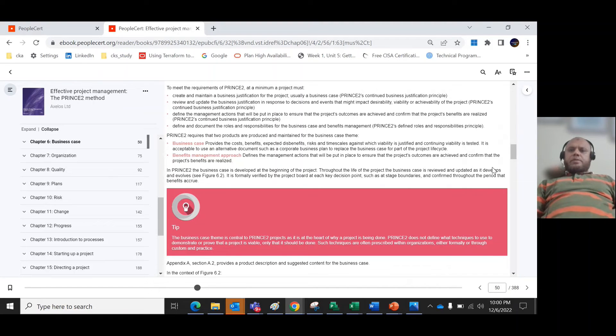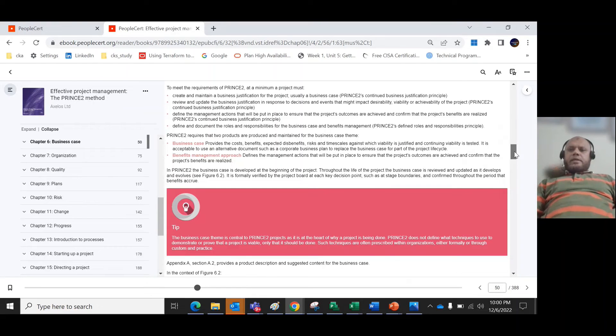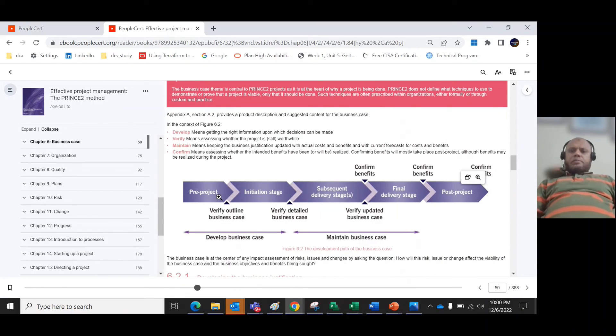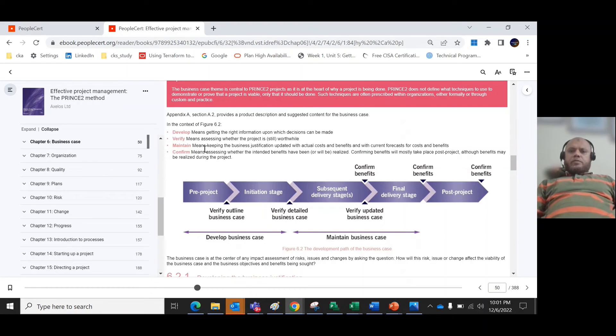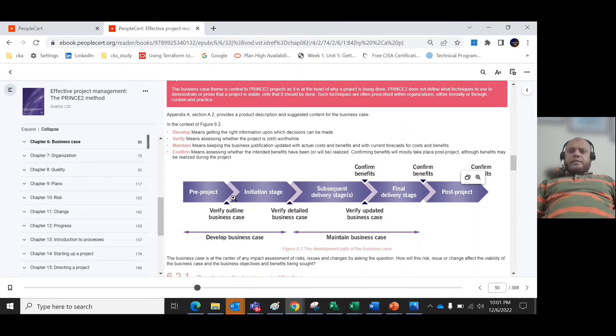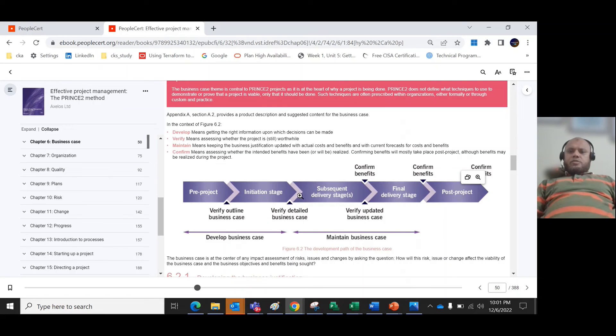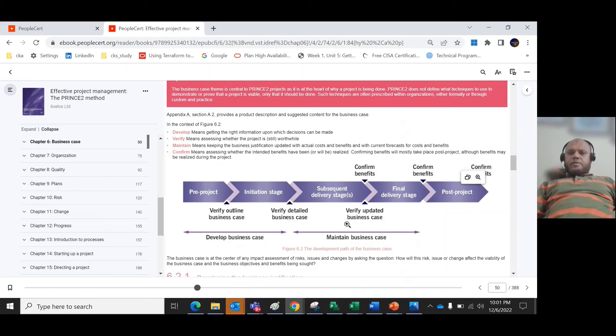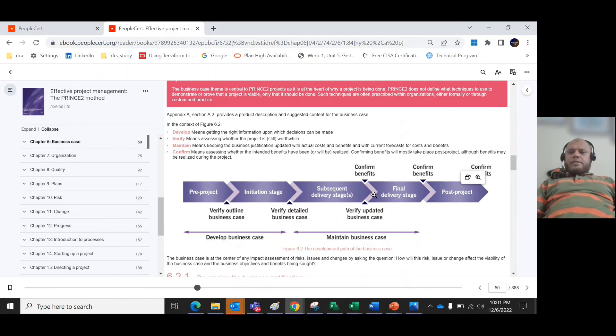The PRINCE2 business case is developed at the beginning of the project. Throughout the life cycle of the project, the business case is reviewed and updated. During the pre-project stage and initiation stage, there are four contexts here: one is the developed business case. In the initial stage of the project, the pre-project and initiation stage, you verify the outline business case and also verify the detailed business case. This developed business case is basically until the initiation stage of the project. In subsequent stages and even after the post-project, we see the maintained business case where we verify the detailed business case, and at each stage we review whether the business case maintains the cost and everything.